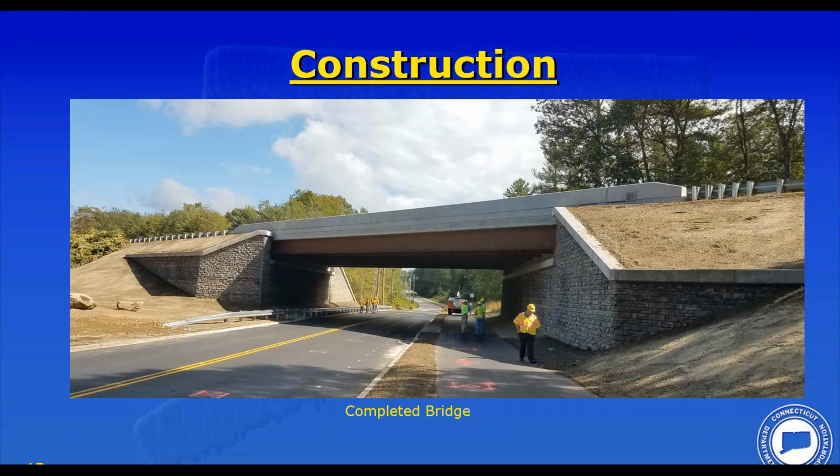Yeah, I'll throw another one in. The one complaint we had on one early SPMT project was one of the, as Tim mentioned, the specifications. It was a disincentive specification that basically said that if Monday morning the road was not open, there was a certain value per 15-minute increment, and it didn't have an upset limit. So it basically said, if you went to like 2 o'clock in the afternoon on a Monday, it exceeded the cost of the project. So the contractors complained, rightfully so, that they couldn't get bonding for the project because there was no